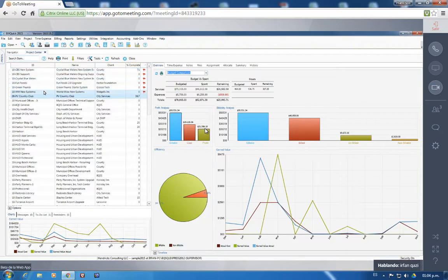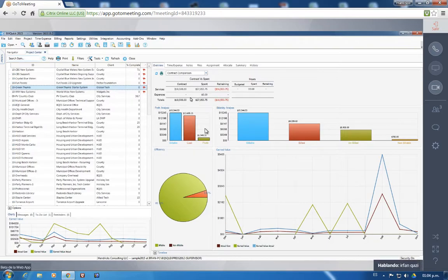Yeah. So look at this one. The project was $10,500 contract, but you ended up spending $27,000, a loss of $16,000 worth of billable time on this one. Okay? So there can be a flag raised based on your options, whether you want to raise it based on the profit basis, budget basis, or contract basis. Okay.